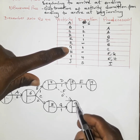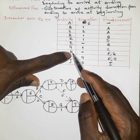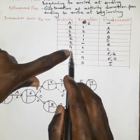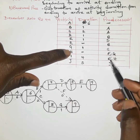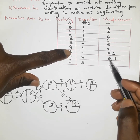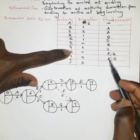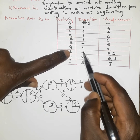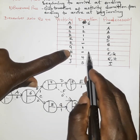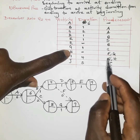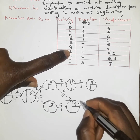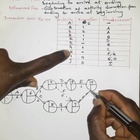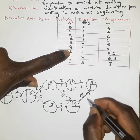Activity H begins as soon as F and G end. Looking at where H affects activity I — as soon as E completes, between E and H we are going to have a dummy activity. Because activity H does not consume any duration, it is going to be a dummy one shown with dotted lines. The dummy leads to where E is, because E and H complete as soon as their previous activities are completed. This illustrates that H consumes zero resources.